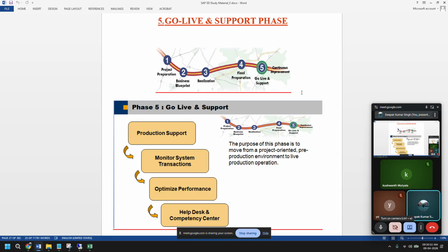So the advantage of going with the agile methodology is that if anything is wrong, the user will immediately tell you. No, this is not correct, I want this one, I told you this much but you have done something wrong, you understood something wrong. Now you can easily identify that problem within 2 weeks only. You say okay, understood, let me correct it. So how much time have we wasted? Only 2 weeks. Not even wasted, because you have developed something, you just need to correct the particular thing the user is not okay with.